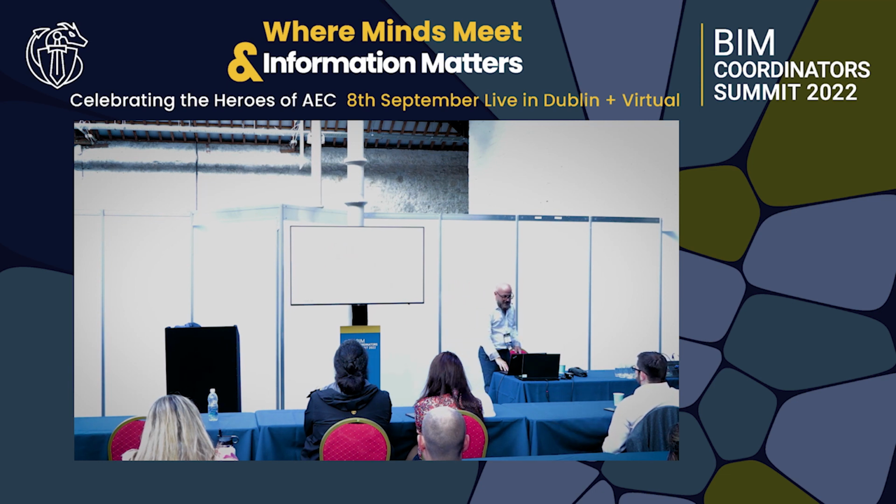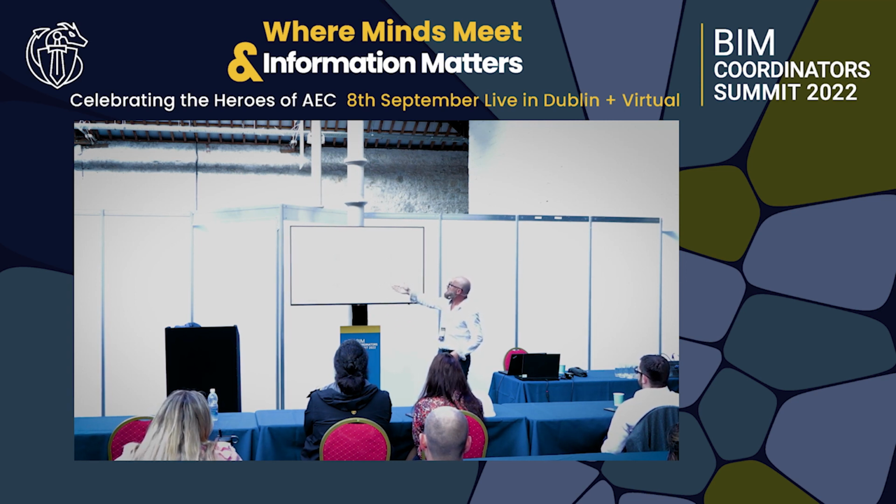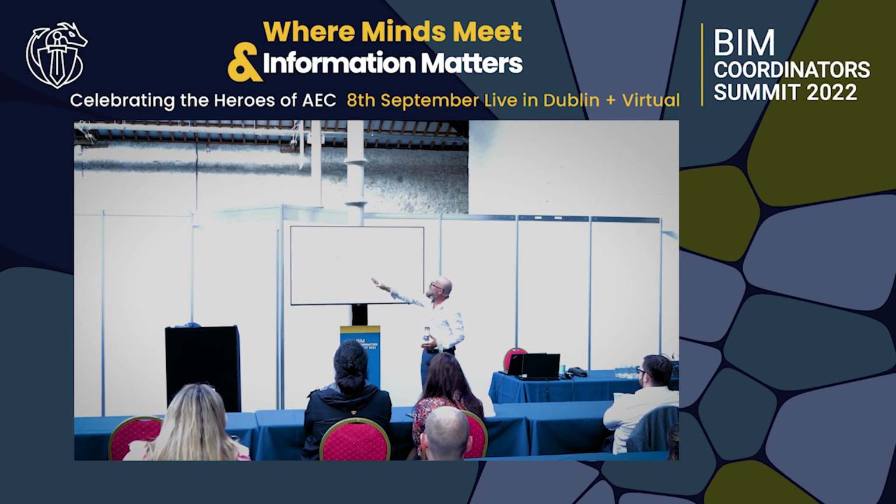What we prefer to do instead is actually this. People don't care about that, and they start to look at that and they'll switch off. So this is one of our standard templates that we use at the start of a project. What stage do we need this data? And what we tend to do is, at stage 3 there, it very rarely ends up like that. What we tend to do is push things like the unnecessary data further back down the chain as we possibly can, waiting for the client to be on, the contractor to be on board. It's very minimal here.